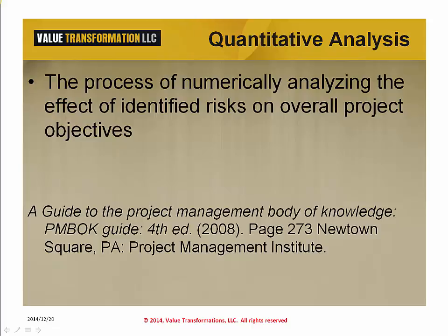If the risk is severe enough, we may decide not to take on the project. Knowing the economic impact of the risk helps us make an informed decision about the money invested in the project. Knowing the dollar amount also provides us with an estimate of the contingency monies required should we take the project on. Contingency budgets will be discussed later.